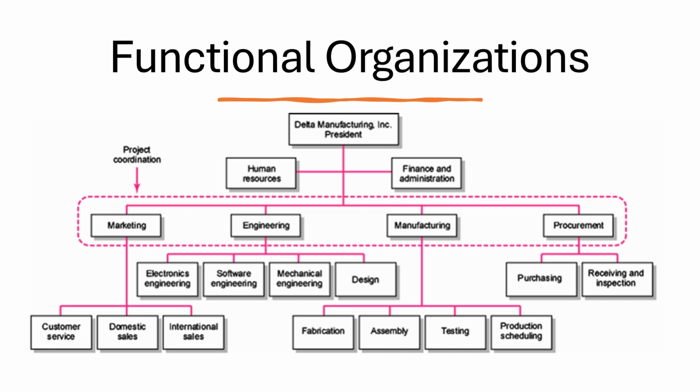For example, a tool manufacturing firm decides to differentiate its product line by offering a series of tools specifically designed for left-handed individuals. Top management decides to implement the project, and different segments of the project are distributed to appropriate areas. The industrial design department is responsible for modifying the specification to conform to the needs of left-handed users. The production department is responsible for devising the means for producing new tools according to these new design specifications. The marketing department is responsible for gauging demand and price, as well as identifying distribution channels. The overall project will be managed within the normal hierarchy, with the project being part of the working agenda of top management.